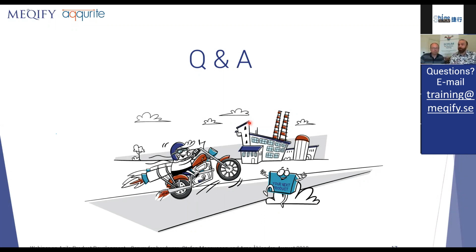In all those teams, most of the persons have been part-timers. So then maybe that's the first issue we should solve. And when you address that issue, usually things fall into place and you can split it into 2 teams. But if there are many people in the team, the first question you should ask is, is everyone a full-timer?